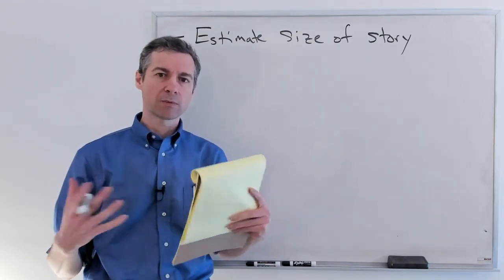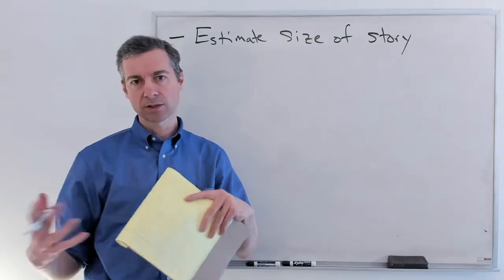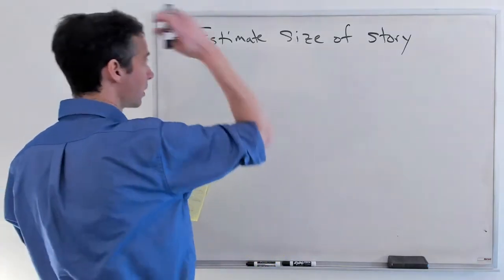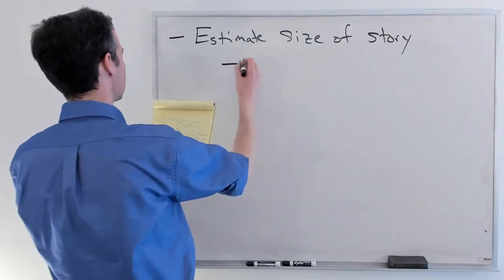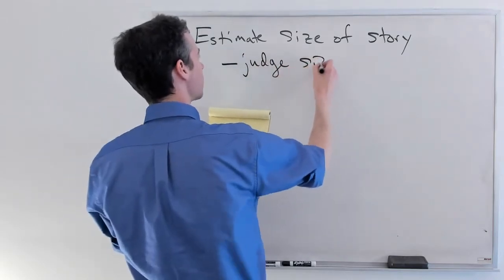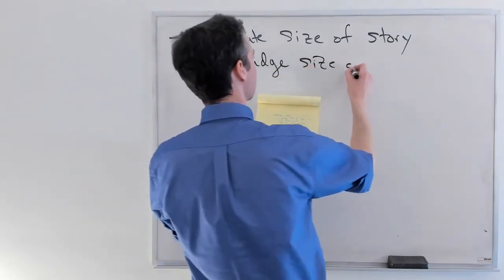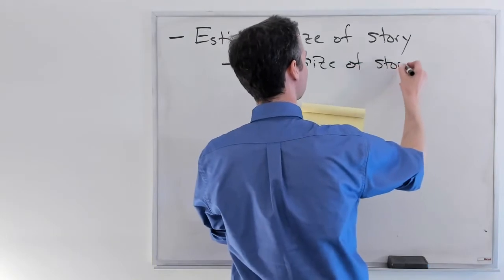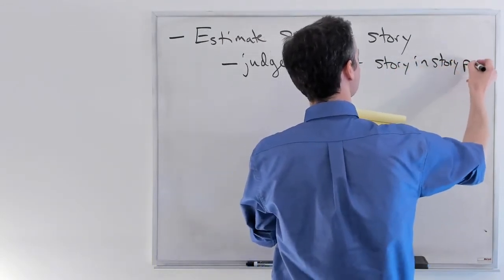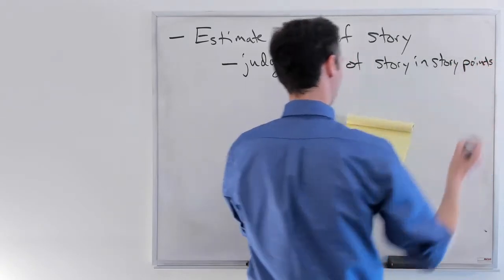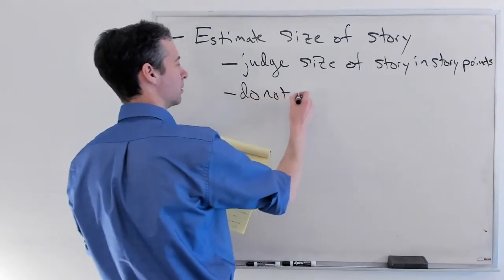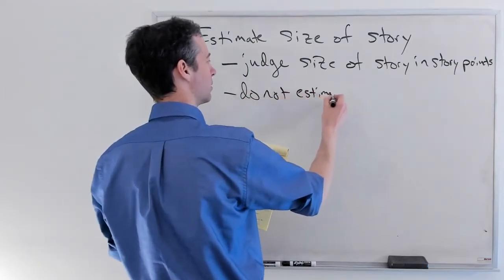And we're going to talk about this, you're going to make story sizes in comparison to each other. Okay, so we're going to estimate the size of a story as follows. Some things important to note is that we judge the size of a story in what we call story points. We do not estimate the size in time to complete.